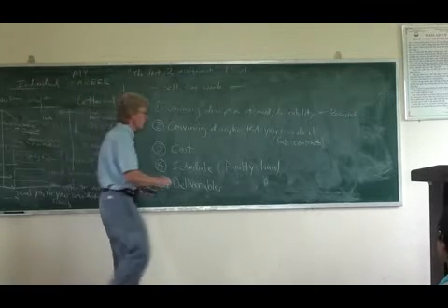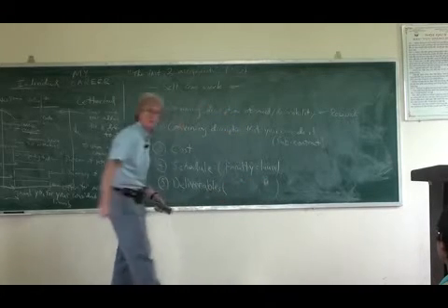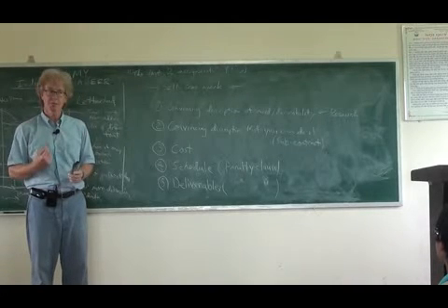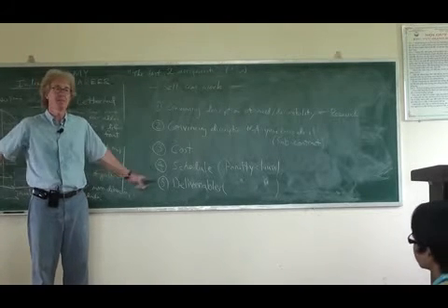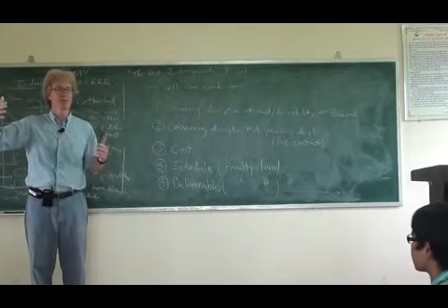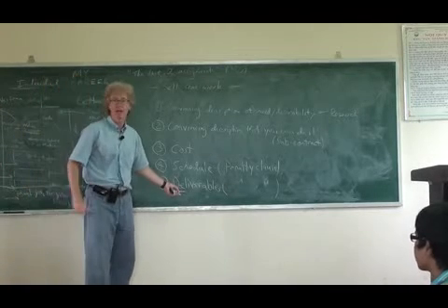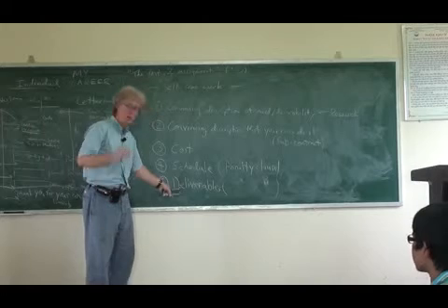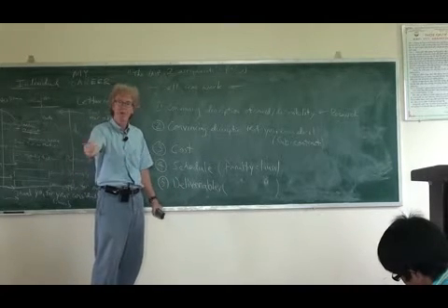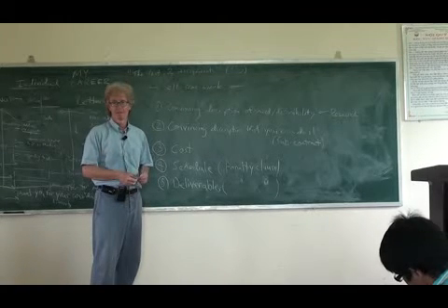And again, there will be penalty clauses. So if I don't deliver something I said I'm going to deliver, it's going to cost me money. If I promise a 15-meter highway, and they find one place between here and Hanoi where it's 14 meters, 14.5 meters, I might lose 10%, 20%. So the deliverable is a very precise description of exactly what you're agreeing to provide, what they are agreeing to pay for. It needs to be precise. Otherwise you get screwed.